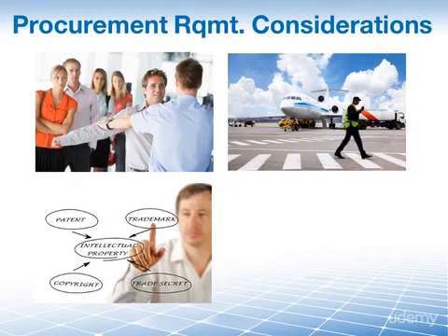Our third example is about intellectual property rights. If your project requires you to set up a new auction site on the internet, when you consider companies to design and build your site, you need to understand if there are any proprietary models, techniques, or technologies involved, and if you and your potential providers have the appropriate rights to use them for the project.